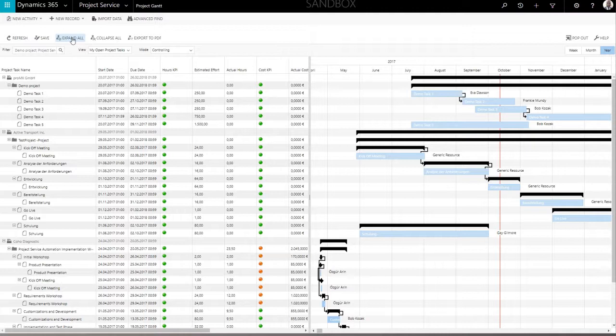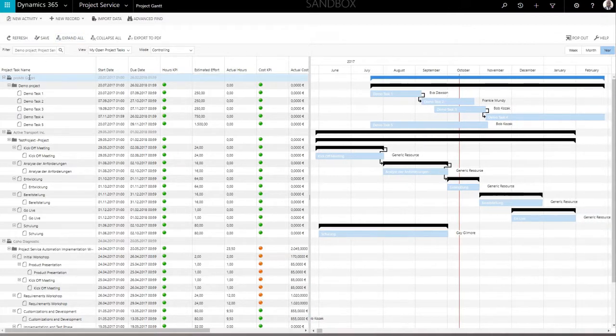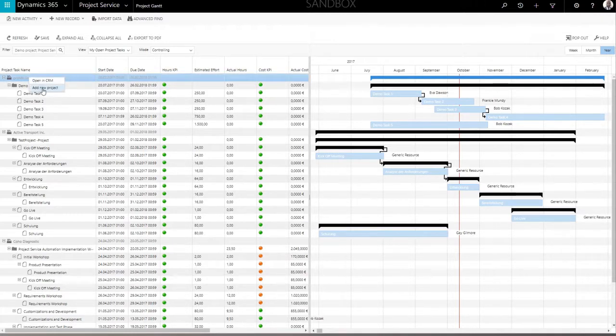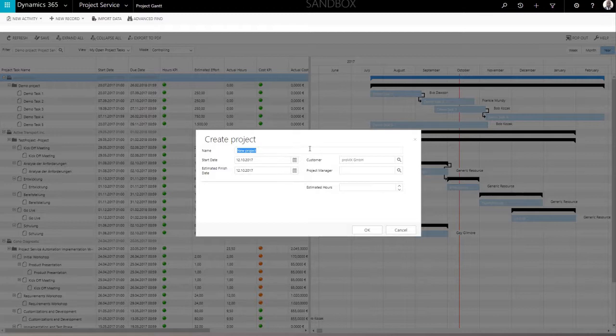To add a new project, select the desired account and open the context menu with a right-click. The initial project form only requires a project name and project manager assigned. However, you may also add basic project information.